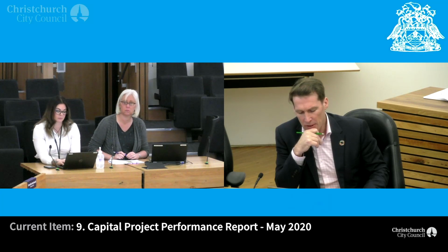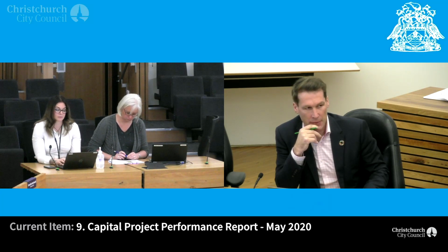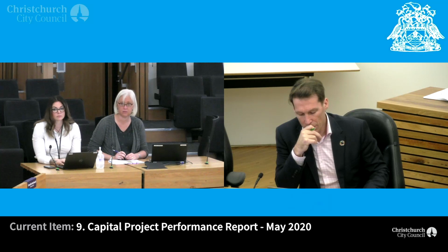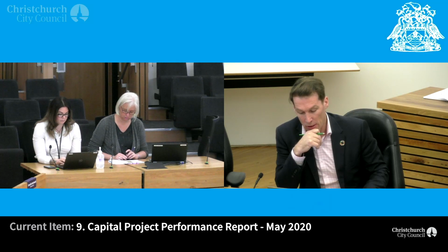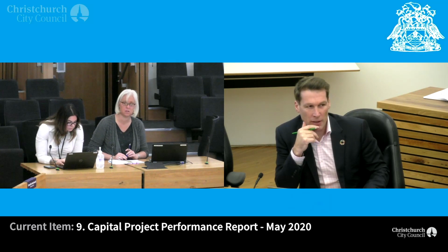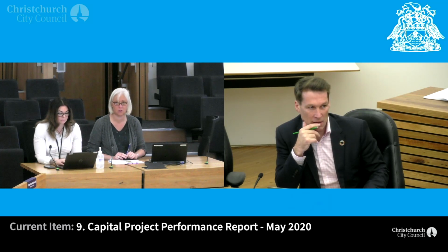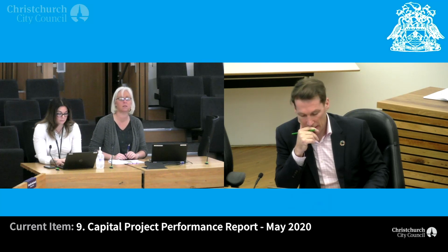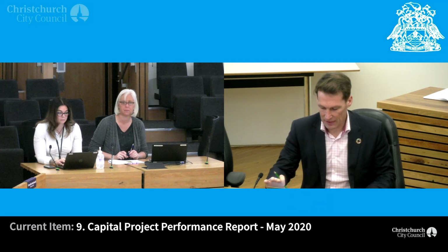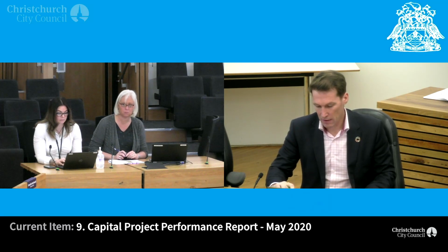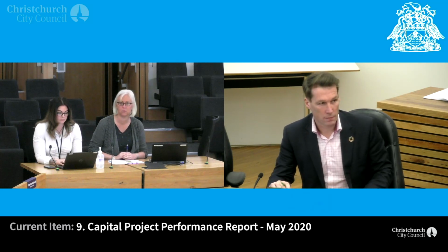What's the likely completion of that project? When do we expect them to be out of there? I will have to come back to you, but I don't believe it's very far away. And it notes in there that there's been increased costs due to asbestos in coal tar. Yes, I thought we had asbestos pipes, got on top of the coal tar issue to stop those unexpected cost increases. It's like services. Yes, we do our best to do that, and we haven't quite got on top of it on that one. So we have done much more potholing than we would normally do. But again, sometimes it's not quite where you expect it to be, despite where you've potholed to find it.